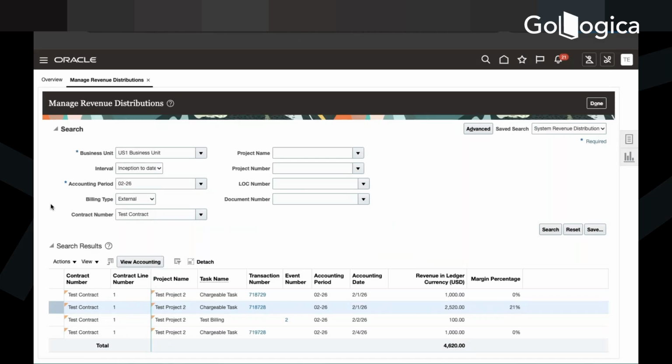But for the PPM related transactions, the revenue generation will take place in PPM, and it will be knocked off in here. So it will not happen in the AR side for the PPM source invoices. For project sourced, yeah. That is the real difference between normal AR invoices and the project AR invoice.